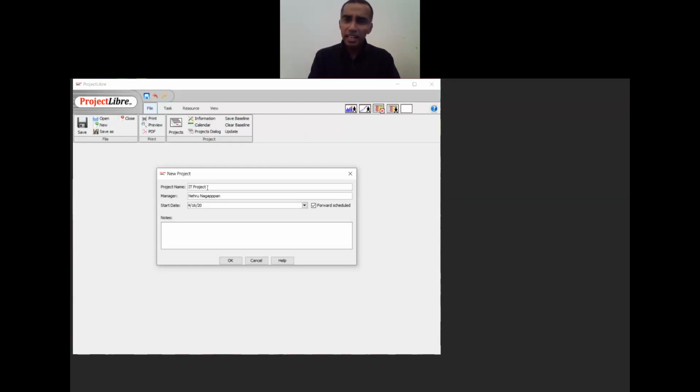The next one is the start date. Now, this is the one I said, step number 2, define project start date. First thing you've got to do is find out when exactly you are starting. If you are doing forward planning, then you enter the start date. And if you are doing backward planning, that means the deadline is fixed and you want to plan backwards, you untick this and you'll see the word finish date. Then you can plan backwards. For now, we are doing forward planning, so we'll have a start date. Let's say our project start date is May 21st. So I choose May 1st, right? May 1st. That's the project name.